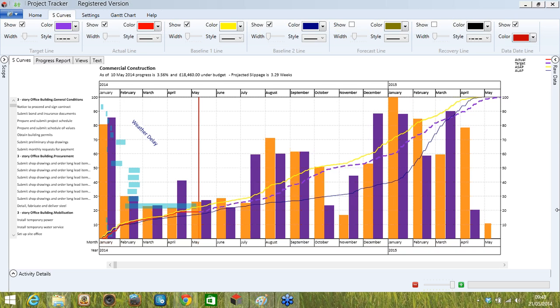Another one, what if I don't use WBS and use only activity codes to group it in P6? Will it be under the Codes tab? Yes, it would. We also bring in the structure of those activity codes. We bring in the heading, and any structure that you have of activity codes, they will all come through.